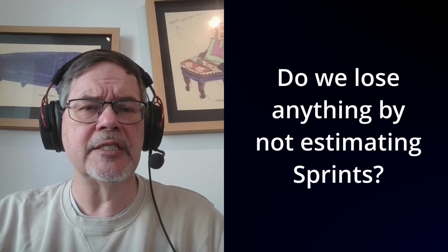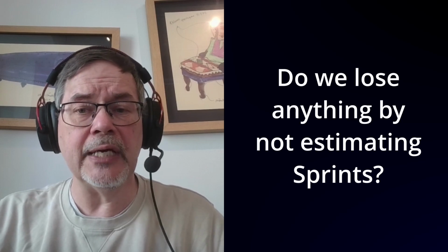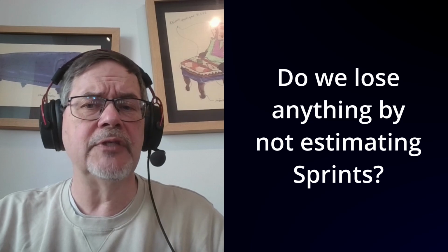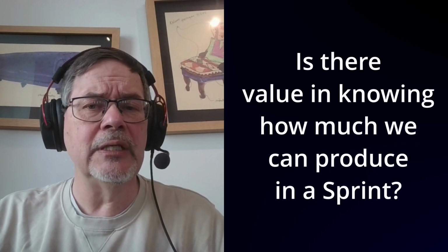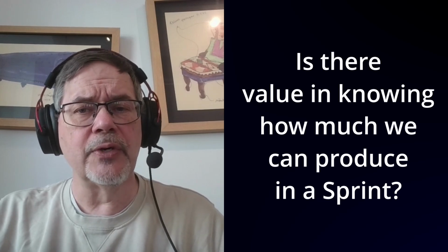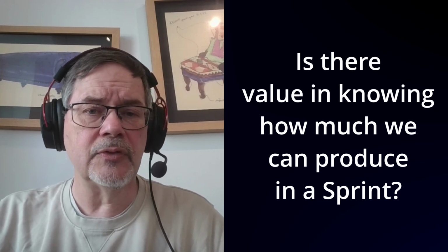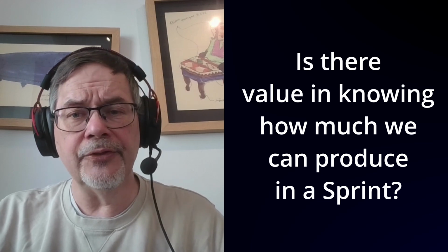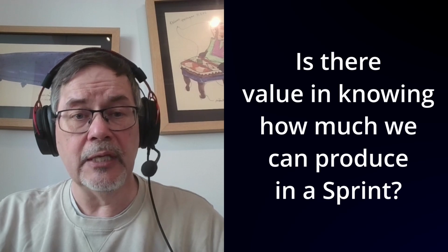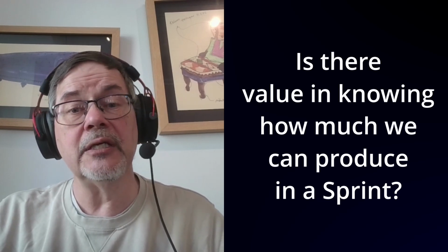Obviously, if we do estimate and the estimates are wrong, we don't know how much work we can do in a sprint anyway. So the question is really moot, but just for the sake of the argument, is there value in knowing how much we can produce in a sprint? So, okay, we work with some kind of vertically sliced requirements like user stories or maybe use cases. We thin slice them so each vertically sliced work package is as small as possible because this improves flow and makes it more likely the team will finish something during the sprint.